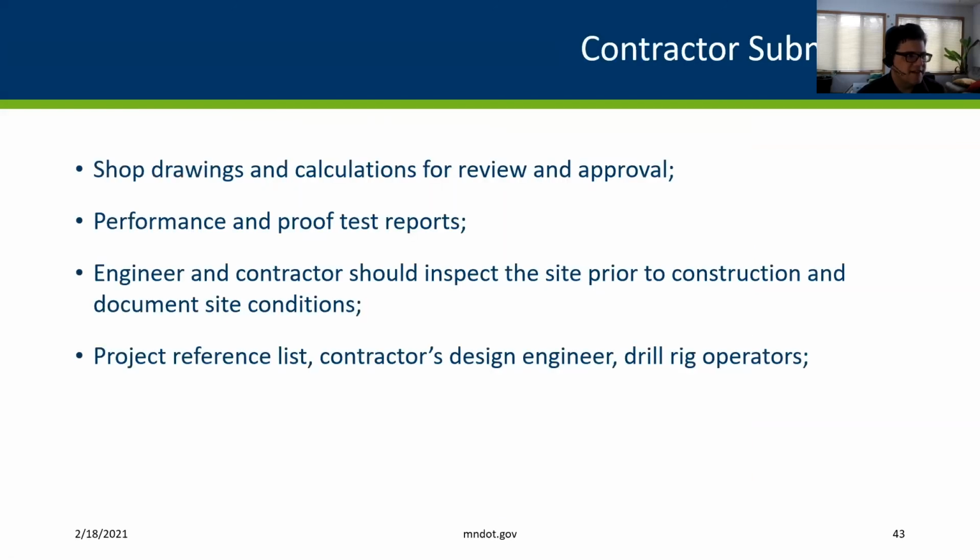So you're going to see shop drawings and calculations for review and approval. What are they providing shop drawings for? Well, the soil nail itself. We provide a load on the soil nail, typically the designer will, and we provide the shotcrete facing and how thick that will be and how it is reinforced, more or less. And then we provide a permanent facing if it's a permanent soil nail wall. Those details are provided by the engineer of record.